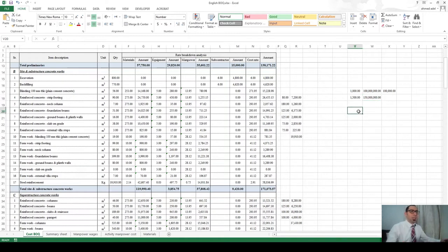Another example of this, a hospital. I did a hospital that has, let's say, 5,000 beds at the cost of, let's say, 500 million again. So how much did each bed cost me? Again, 100,000. So if I make a new hospital that will have only 4,500 beds, then this one times this one, so it will be around 450 million. So this is the end units, how many units and how much the project cost me from the historical data, and based on this knowledge I will do an estimate in 30 seconds. Of course, it's a conceptual estimate.